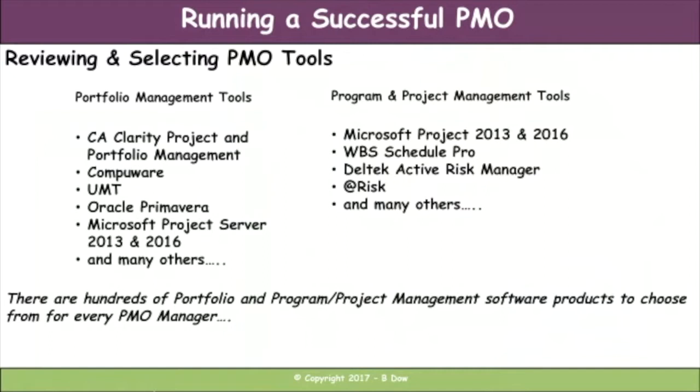Get that. But one of the key components of building and bringing in tools is to understand the processes that are associated to those tools and the data entry that's associated to those tools and the reporting that's associated, right? To bring in something like CompuWare or UMT or Clarify, whatever the case may be, to bring those products in, they come with a ton of process, right? And your organization may or may not be ready for that process. So it's really, really important that you understand the processes and the tools and the reporting that are all together when you bring a tool like that in. Don't buy every tool out there. Don't get sold on it. Bring tools in as you can handle, and your organization can handle the maturity of that.